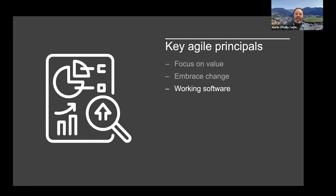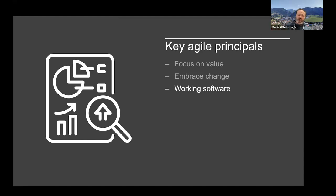Working software is the primary measure of success. After every iteration you have some version of working software with some incremental addition of value that banks the work done so far. Occasionally you might do what we call a spike — a bit of a research exercise. When starting projects where we're very uncertain, in REG we often do something called a back brief: a week or two where we talk to people, do extended scoping, and look to understand the data and the problem. That might result in a summary paper, or you might build some software to try out an approach and then throw it away. What you've banked there is the learning.